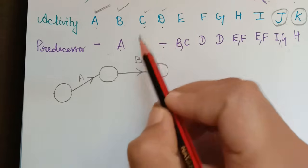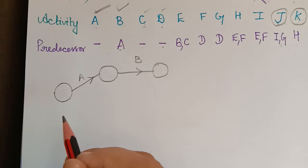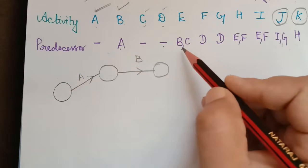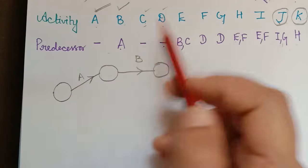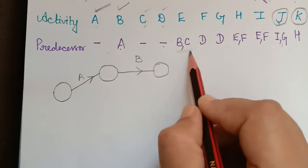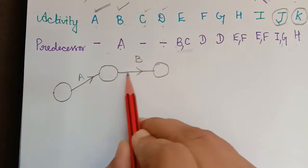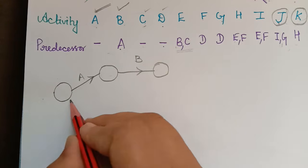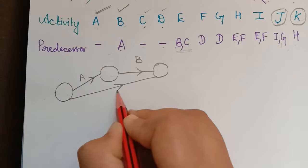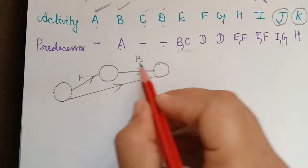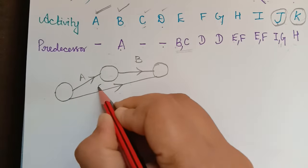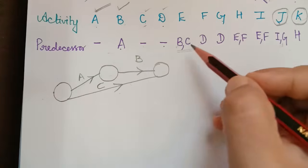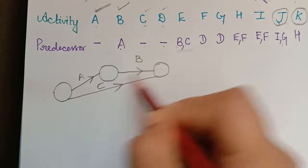Activity C has no predecessor, but we must check whether it appears alongside any already-completed activity in the predecessor list. C appears together with activity B, which is already completed. So activity C starts from a new node but must end at the same node as B, because they appear together as predecessors.